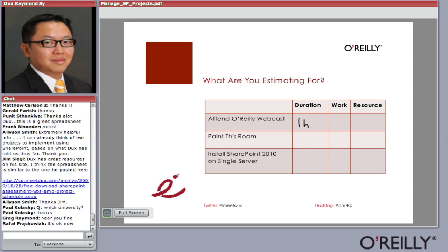So right now, last I checked, I think there were 100 people in the room, maybe more, maybe less. If we had 100 people attending this webcast, the effort, the work that was spent here is 100 hours. I'm sure everybody's with me on that, right? So we've just spent 100 hours' worth of effort to attend this webcast, which is cool.